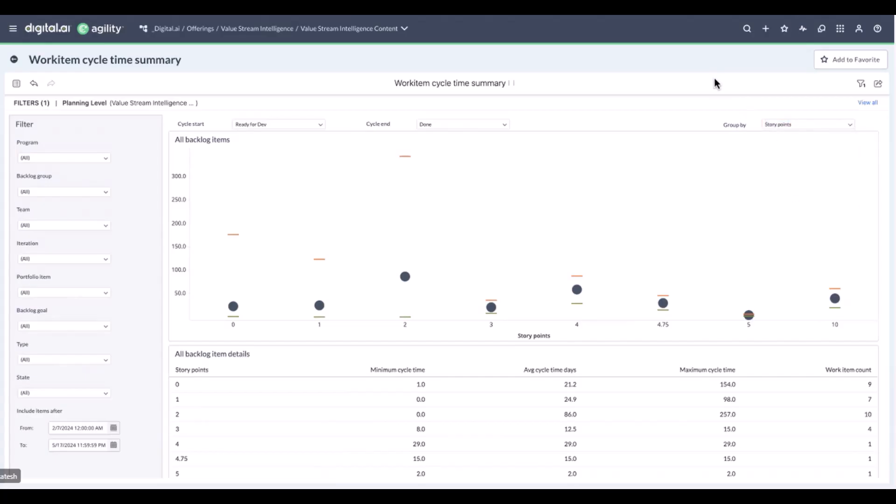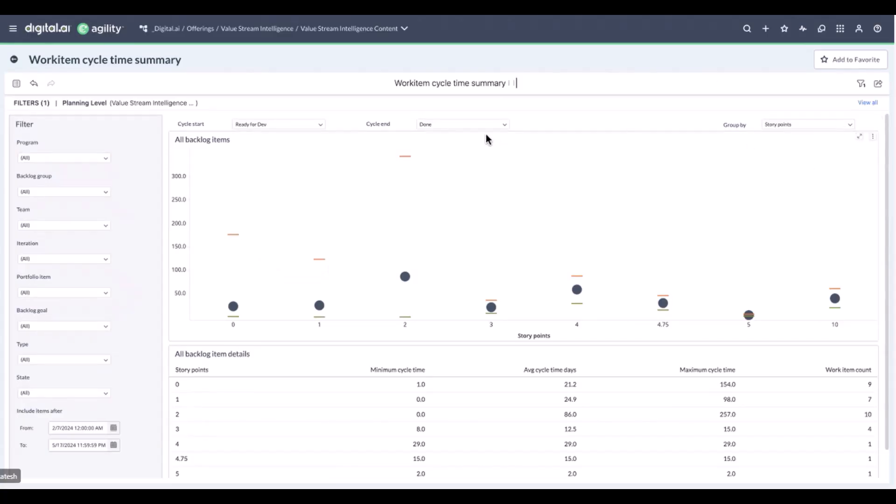Usually customers use these dashboards to understand the flow of things, so the cycle time between various stages from the initiation to the completion stage. The cycle itself refers to the duration between any two options within the cycle start and the cycle end. There are three key data points being shown here: the maximum amount of cycle time. So the way to read this chart would be, for all of my work items or backlog items that we have between dev and done, I've grouped by my story points. So whatever has the maximum amount of time that it took for it to go from ready for dev to done is about 154 days.